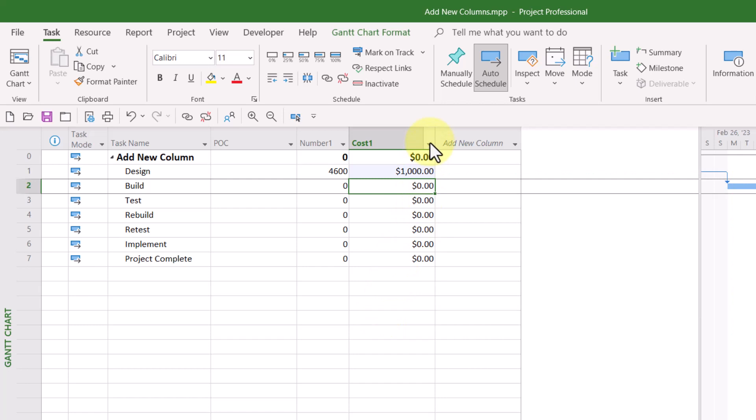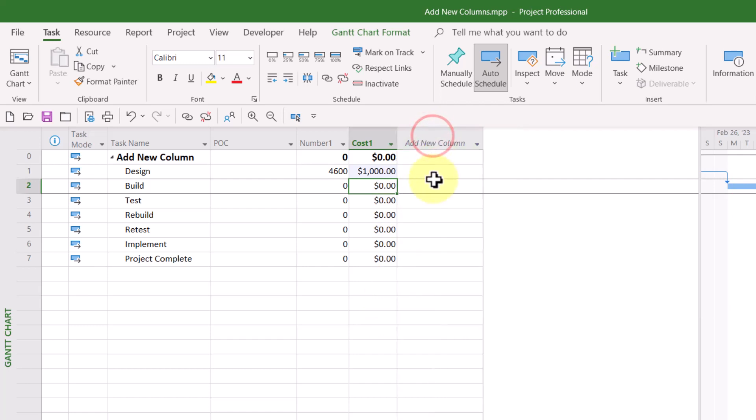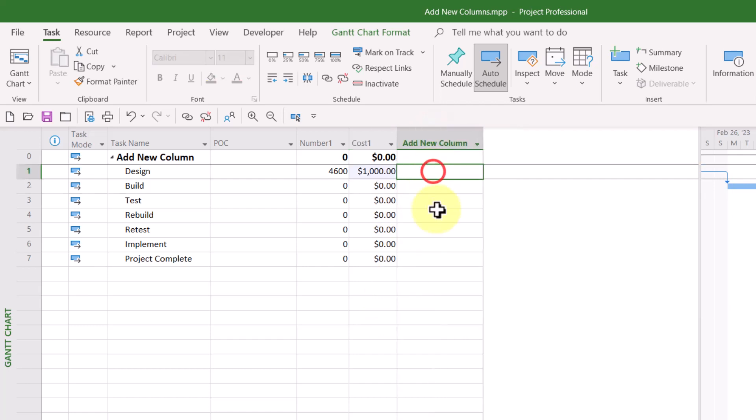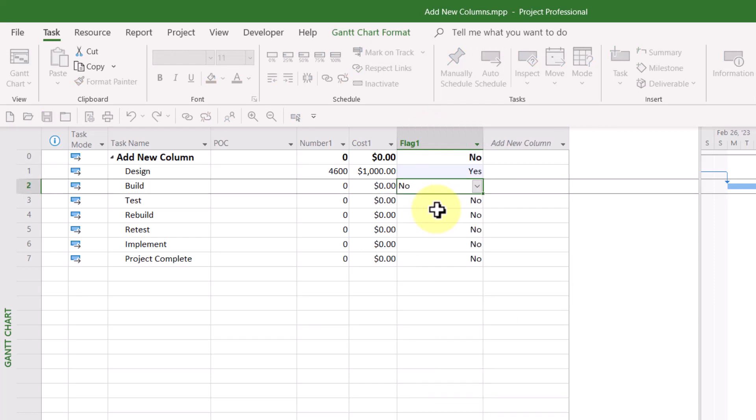And if you type either a yes or a no in the Add New Column Virtual Column, you might have guessed Microsoft Project will automatically insert the first available flag field, which in my case would be the flag one field.